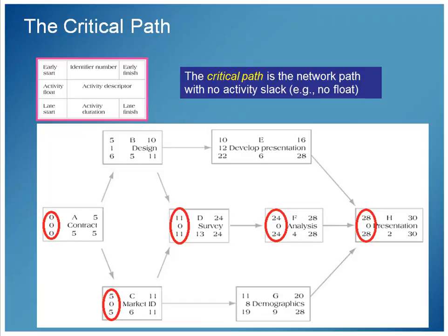Those activities on the critical path, those are the activities that if they go a day or 2 or 3 long, then we miss our project deadline for a day or 2 or 3. Now, if I miss node B here by 1 day, that's okay. I actually have 1 day of slack built into that. I can miss G by 8 days. I could start this whole project a week late, as long as I spend some resources making sure that C and D and F are done on time. Because these are my critical paths. Missing these days is going to be a problem for us. Where I have slack, I now have this in my node.